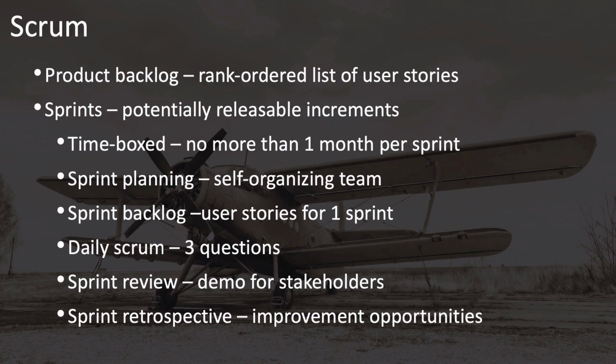Then you have, during the sprint every day, a daily Scrum, which asks everyone to answer 3 questions. What did you do yesterday? What are you planning to do today? And what, if anything, is getting in your way? What are your barriers? This allows the team, in a quick stand-up meeting of about 15 minutes or less, to understand what everyone's working on and to have opportunities to step in and help one another with any barriers or roadblocks.